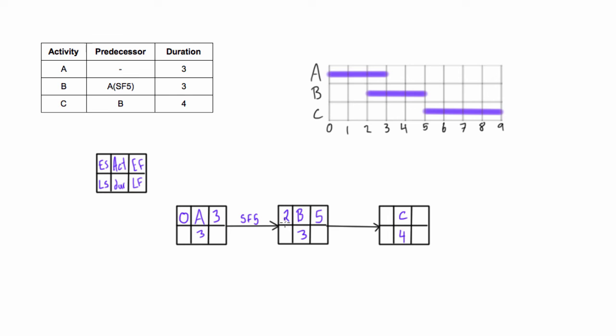Now looking at activity C, this is just a regular finish to start relationship, so bring that five from the early finish of B into the early start of C, five, and then we'll add the duration, five plus four is nine. Now for the backward pass, we just bring the nine down because this is the last activity in the project and subtract the duration from it to get five for its late start. And then because this is just a regular finish to start relationship, we'll bring the five over and subtract the duration to get two.